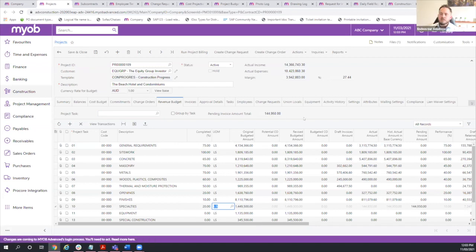That's excellent. So that's that gap, right? You had a variance there, now an extra 10% has been completed, and that now automatically tells you that needs to be invoiced out, right? Yep. And again, that's an automated thing in the system. Once you run the invoicing, it's going to capture that, and depending on how you want to structure your claim report to the customer, you can do that in the system.